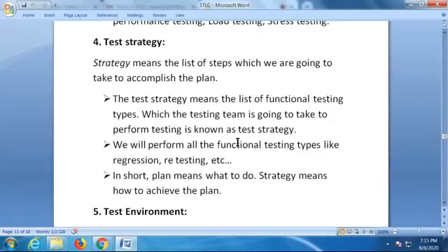Two weeks before, your team lead should send the list of hardware and software to your system admin people. If execution is tomorrow, I can't send it today and ask them to set up everything; that's not possible. Two weeks before, we should list out what techniques we have to implement, what hardware we require, what software, what type of machine, what OS, what processors, and how much memory. So this setup is not our setup here. This setup is the client setup.